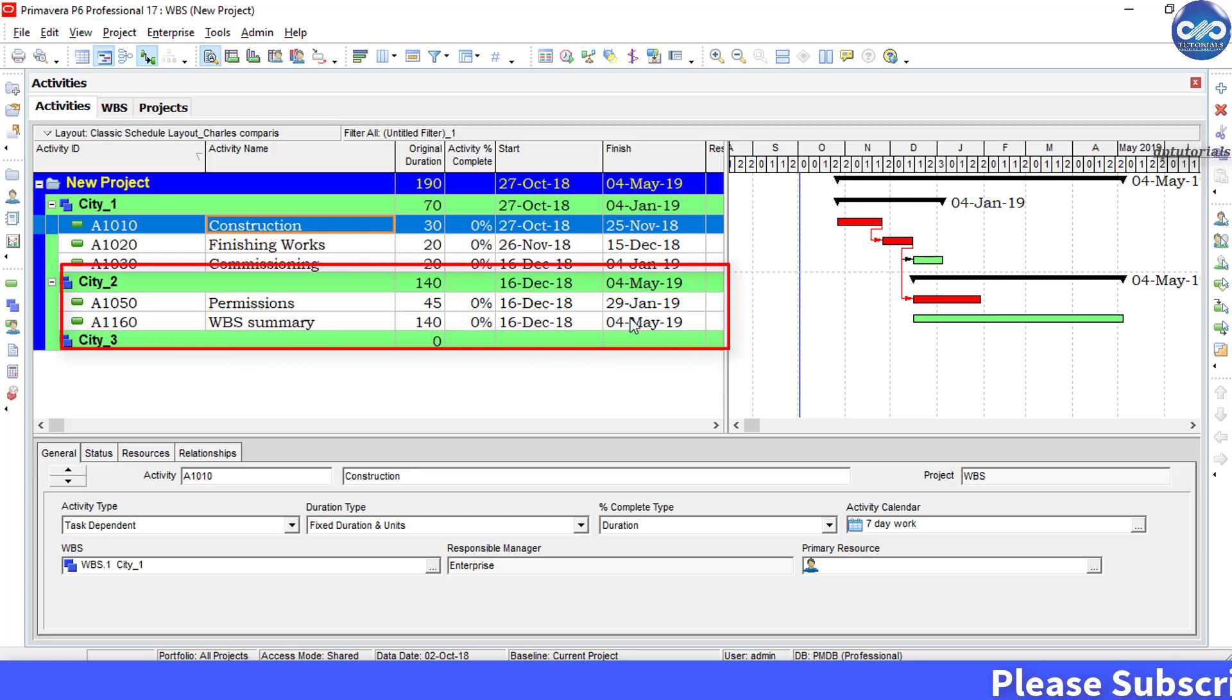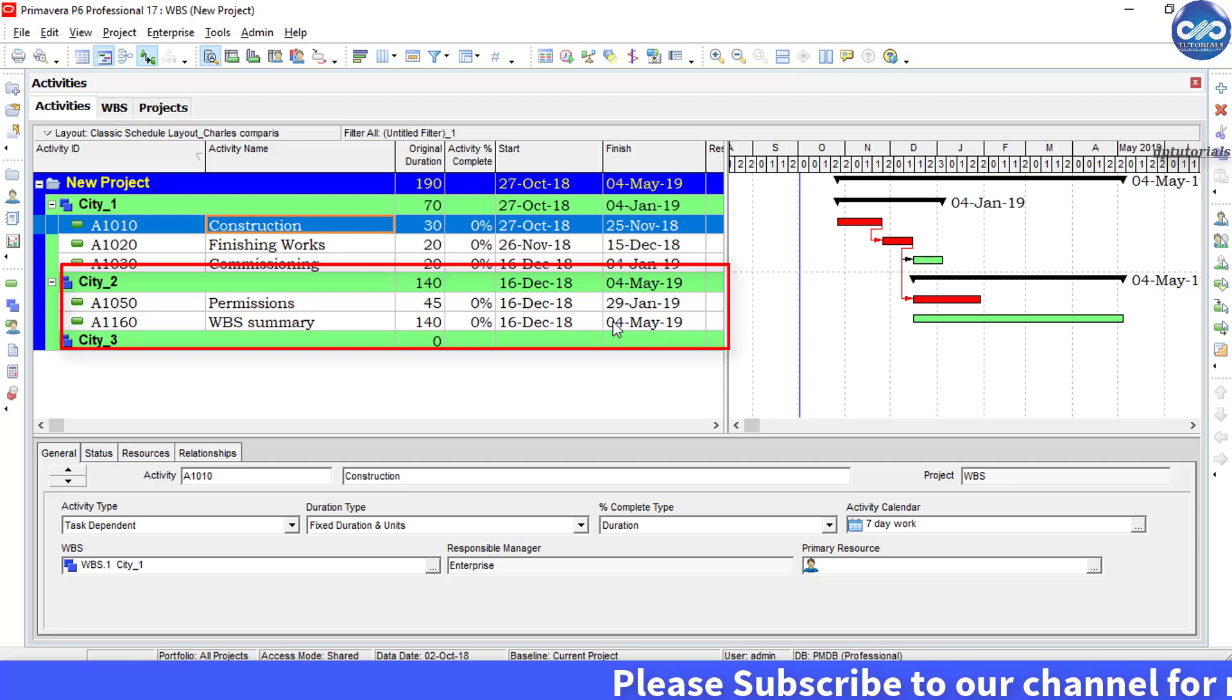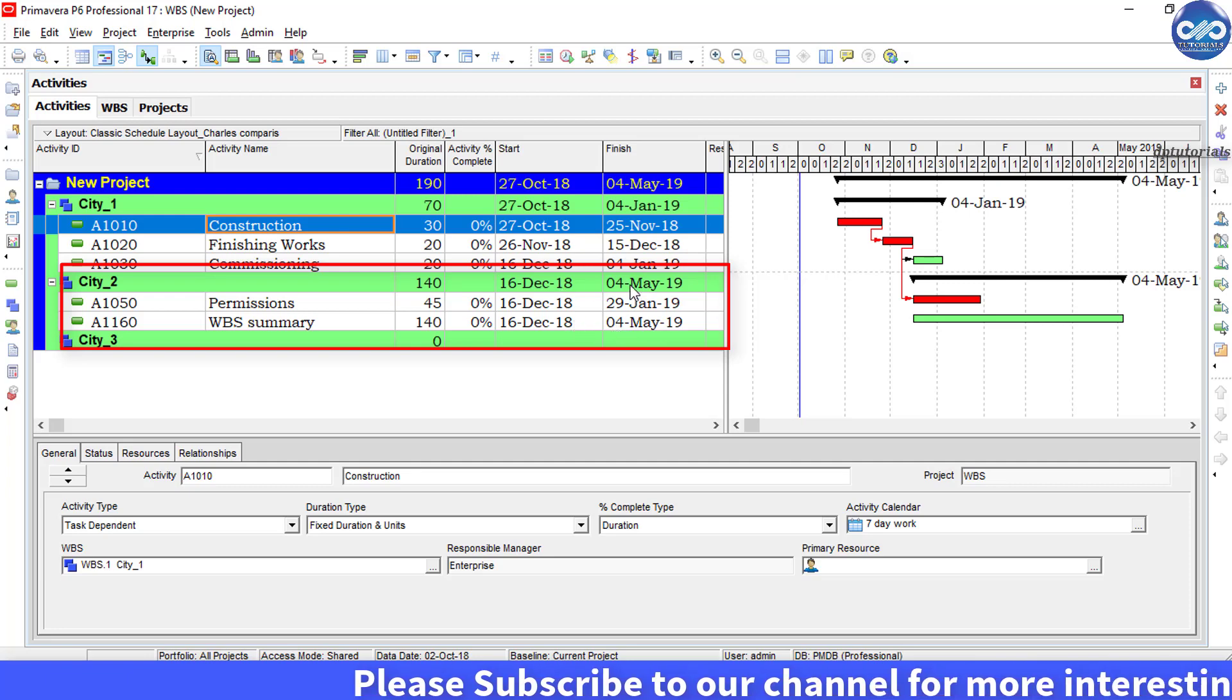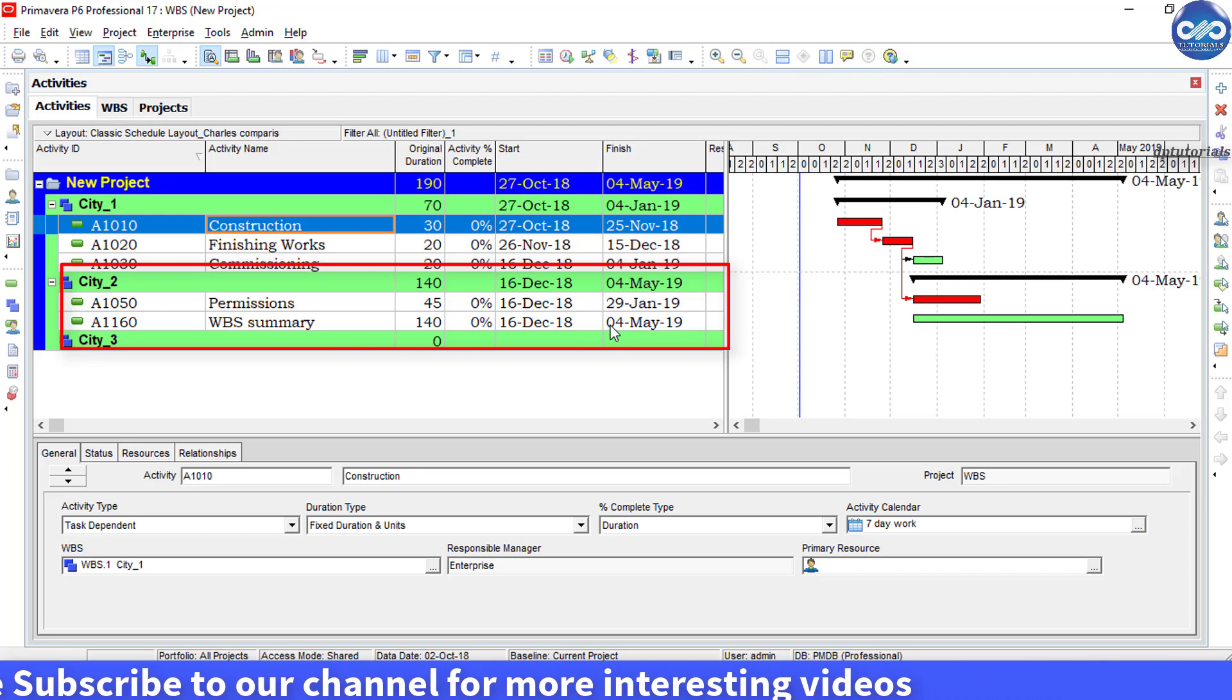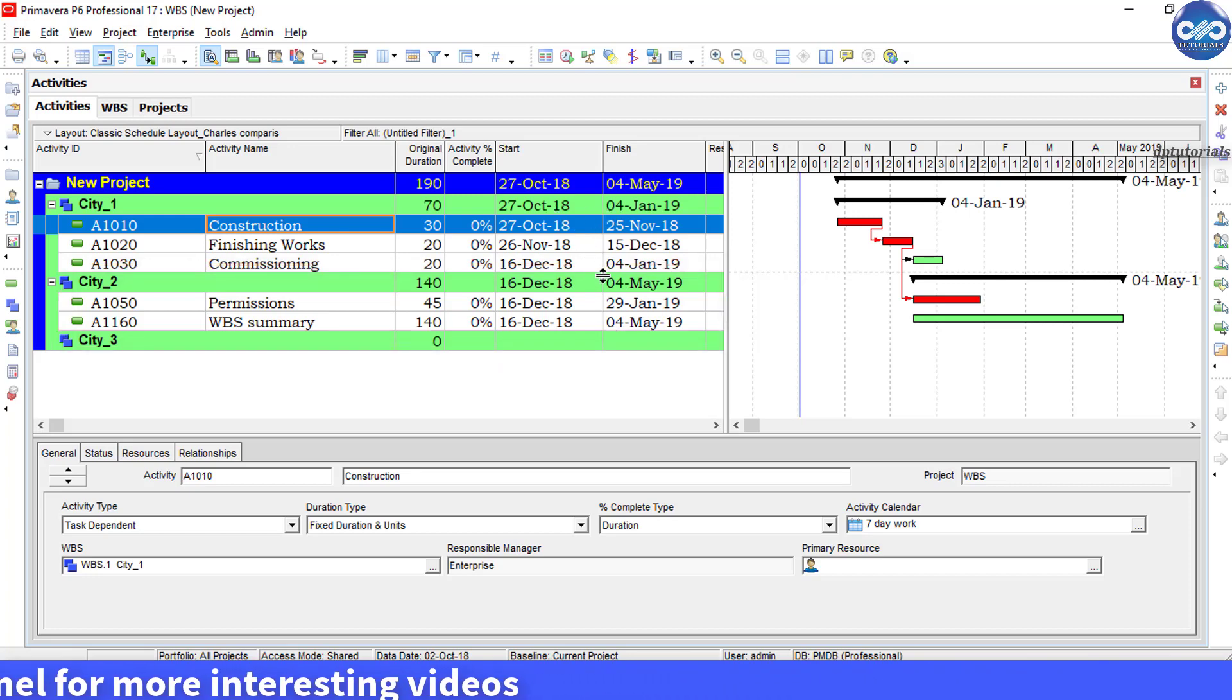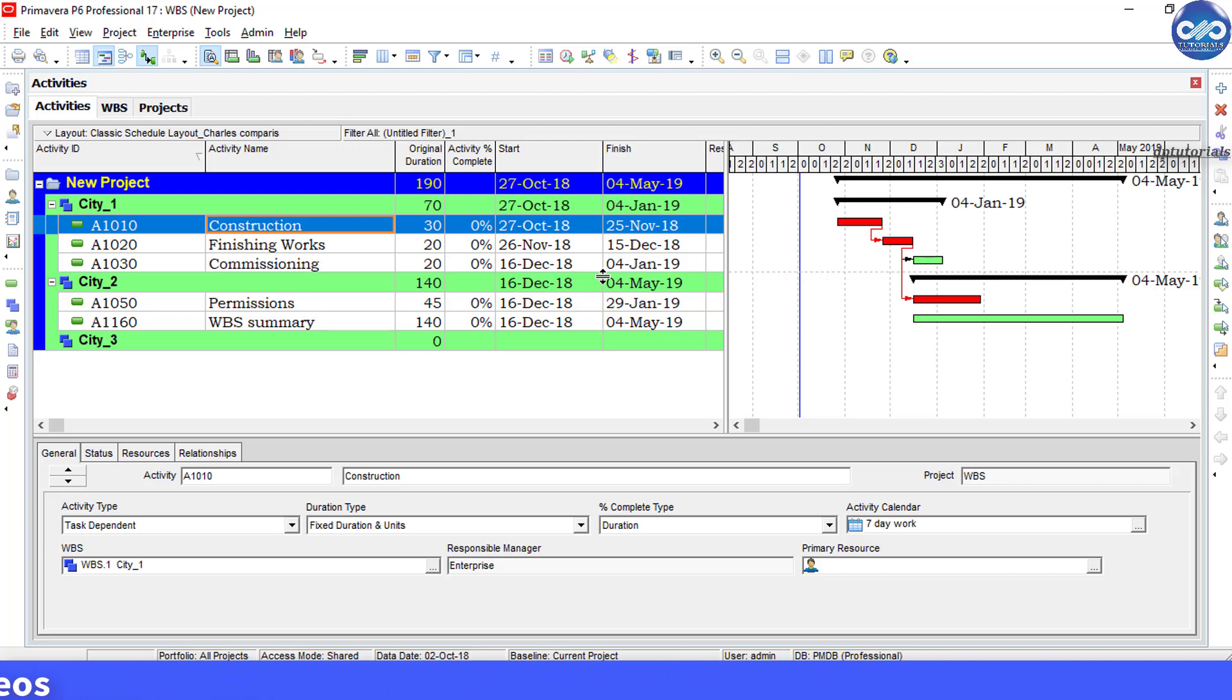Now see the difference. Now the WBS city 1, city 2, city 3 are showing the exact dates that were showing for the even the unfiltered project. So friends, in this way we can show the right finish dates for the WBS items in Primavera using this WBS summary type of activities.